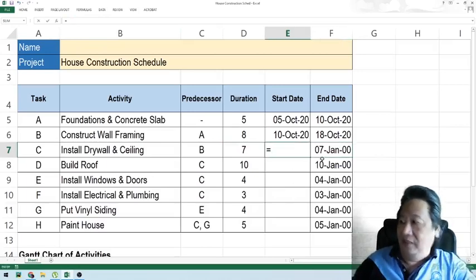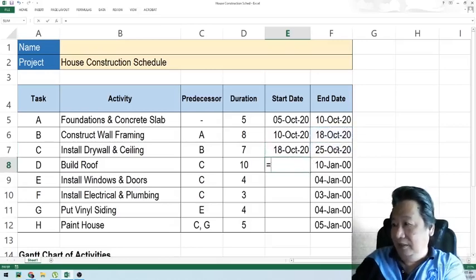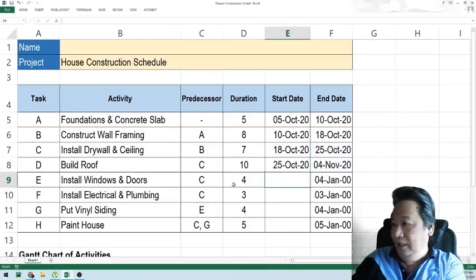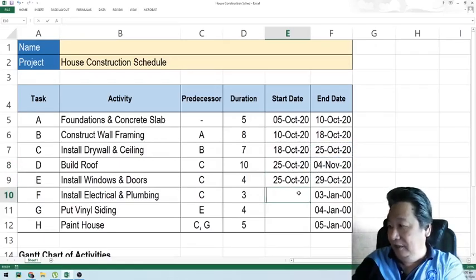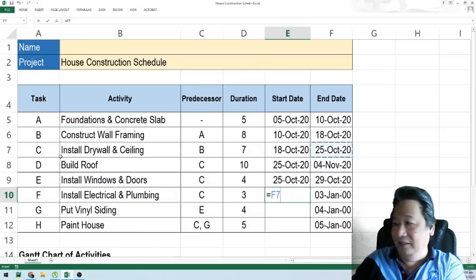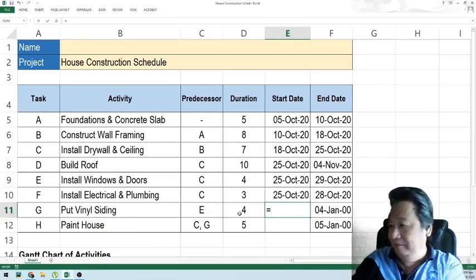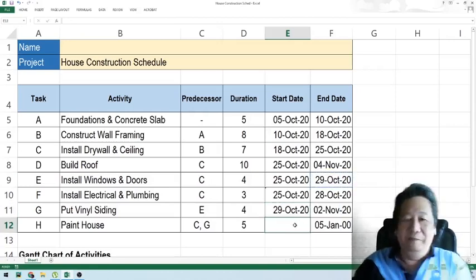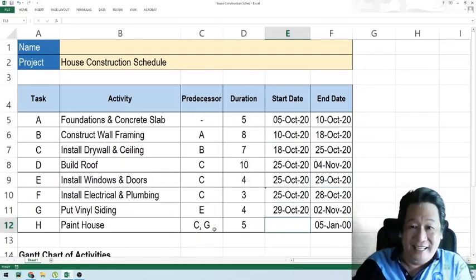Activity C starts after B, Activity D starts after C, Activity E starts after C, Activity F starts after C, and Activity G starts after E — which is the installation of windows and doors. Activity H starts after whichever activity ends the latest.